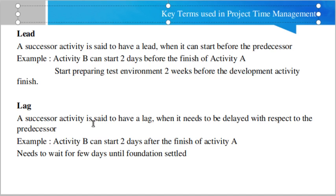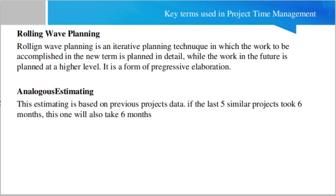Next is Lag. A successor activity is said to have a lag when it needs to be delayed with respect to the predecessor activity. For example, activity B can start two days after the finish of activity A. A practical example: you need to wait a few days until the foundation settles before you can start work on the pillars.